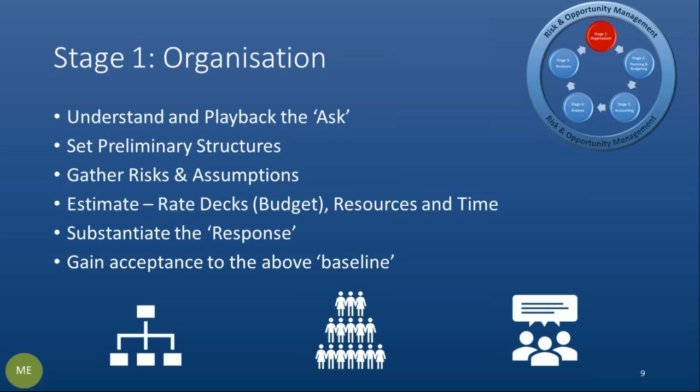The how is really where a lot of the work is done in the very first instance. Structures comes to mind first of all. Here you're looking at product, work, organization, and cost. The product breakdown structure is all about the technical attributes, how you're going to do the work, what technical pieces of work need to be done in what fashion, in what timeline, etc. What key milestones you think you're going to need. The work breakdown structure goes further than the product. It adds to it, if you like. It's a hierarchy of that product, but it includes the services and supports that are going to be required to accomplish that work. It's extended into manageable elements.